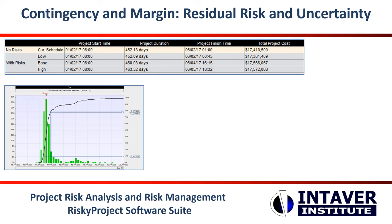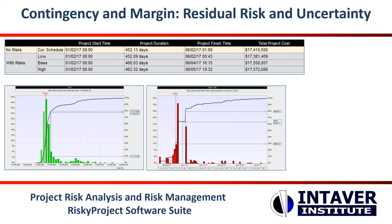We can set up our simulation outputs to these risk tolerances, displayed in visualizations or tables at the project or activity level. Recommended practice is that the schedule margin and cost contingency are inserted back into the management baselines at the delivery level and can be measured against actuals during execution.